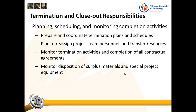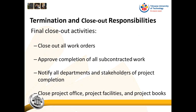The final closeout activities include closing out all work orders — ensuring that everything promised is complete and telling people to stop working on the project. As a practicing project manager, I've seen people still booking on a project three months after it's complete. It's your responsibility to make sure people know the project is completed, that they are no longer allowed to book on the project code, and that the team is satisfied that all the work has been completed.